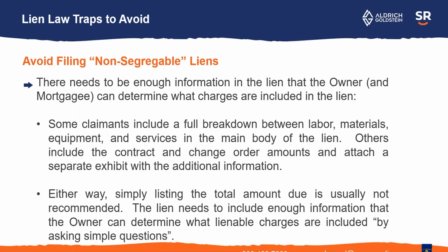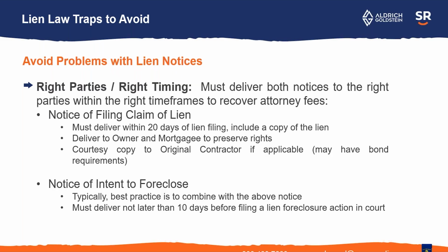Non-segregable liens, that's the exhibits that I was showing you that break down the amounts owed. That's why you want to include that kind of information in the lien if possible. That way the owner or the bank, whoever's looking at the lien, has some idea of what's included in the lien.